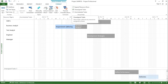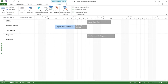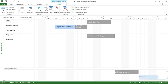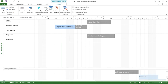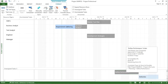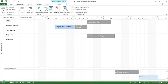Similarly, it has a window for unassigned tasks and unscheduled tasks. Now if I click on unscheduled tasks, I can see some changes at the bottom of my screen. If I click on unscheduled task on the left hand side, it will come and go away. So what is an unassigned task? These are tasks which have not been assigned — there is no resource assigned to them — and that is the reason they are showing under the unassigned task section.